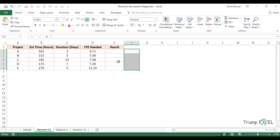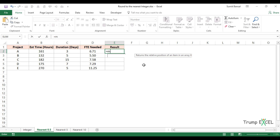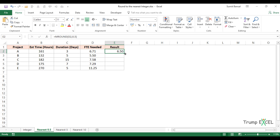Let's see another example with the same dataset. Instead of rounding to the nearest integer, as a project manager you might allow an employee to work half a day. So you can round to the nearest multiple of 0.5. To do that, simply use the MROUND function with the number and a multiple of 0.5. This gives numbers rounded to the closest multiple of 0.5.